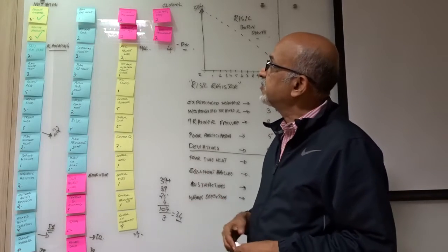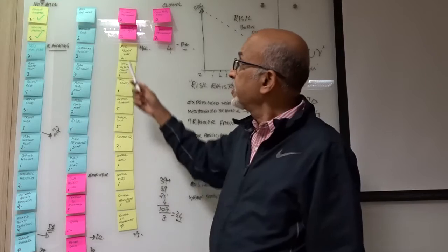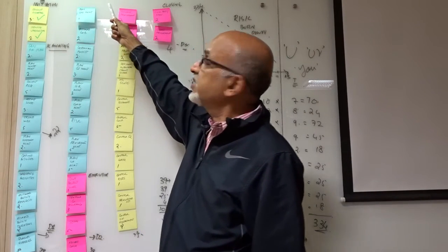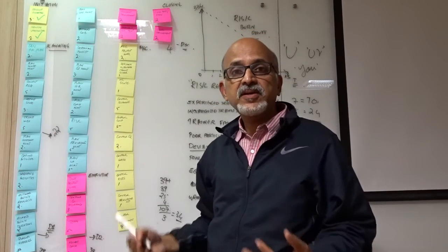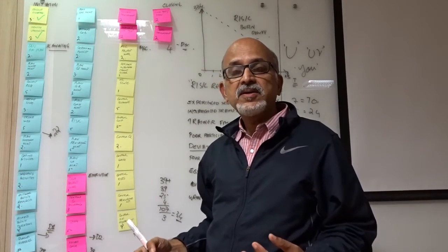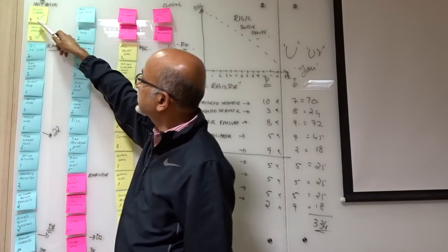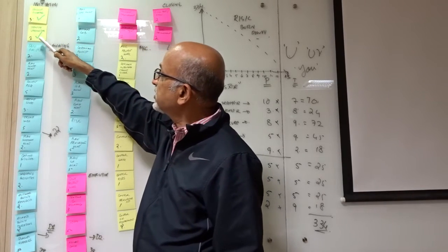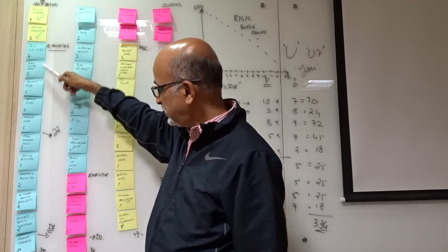As a next step, we gave some weightages based on the Fibonacci series of 0, 1, 2, 3, 5, 8, and 13. The higher the number, the higher the work involved; the lower the number, the lower the work involved. Develop project charter carries a weightage of 3, identify stakeholders carries a weightage of 2, develop project management plan carries a weightage of 2.